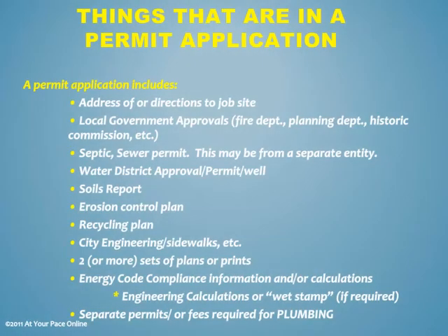Things that are in a permit application. A permit application includes address or directions to job site, local government approvals, fire department, planning department, historic commission, etc. Septic, sewer permit. This may be from a separate entity. Water district approval, permit, well.